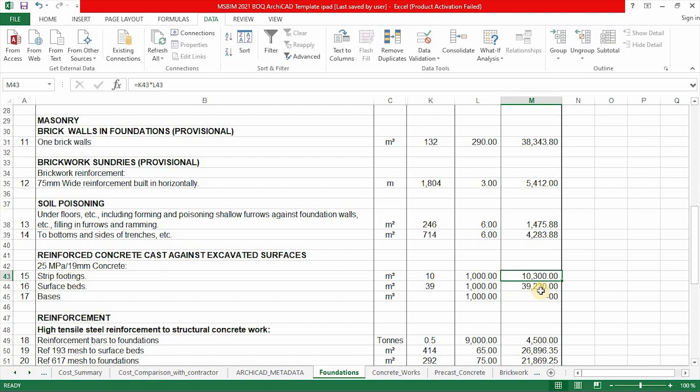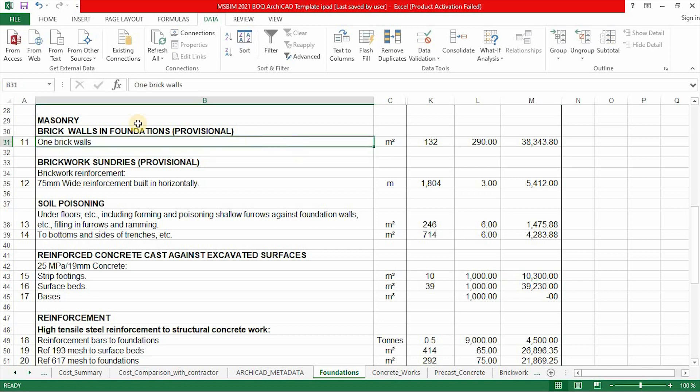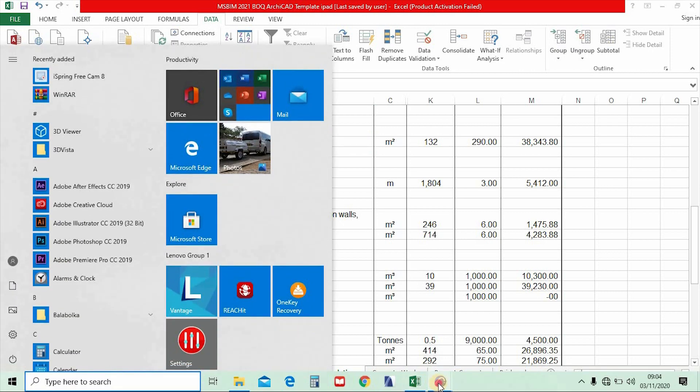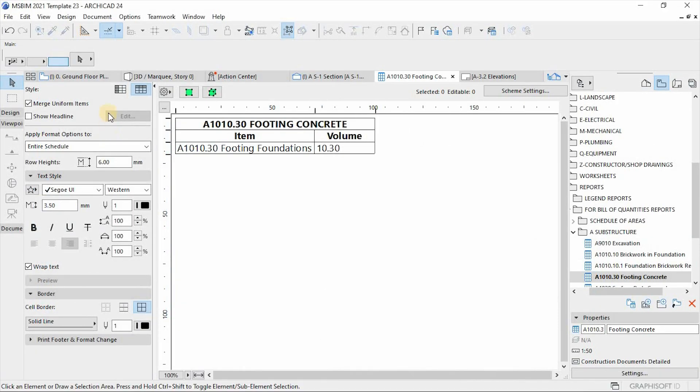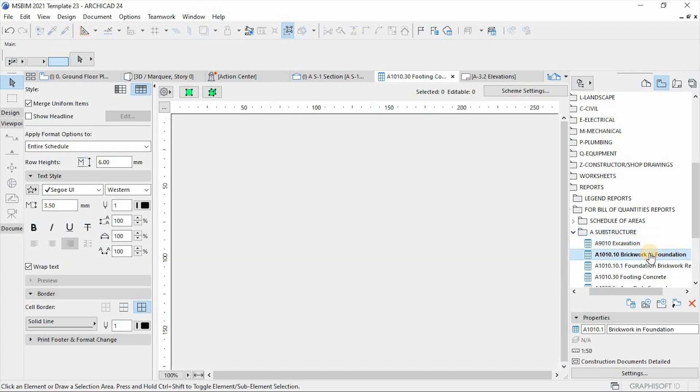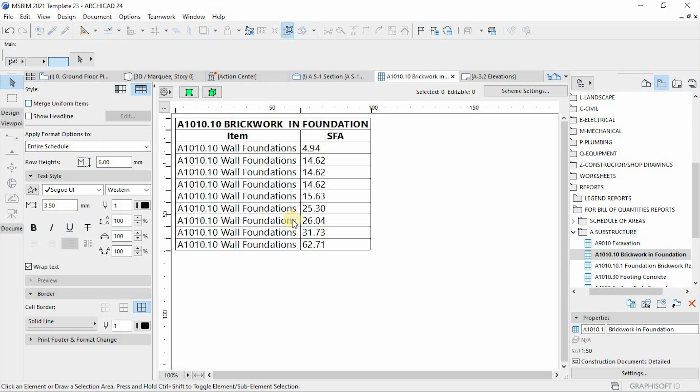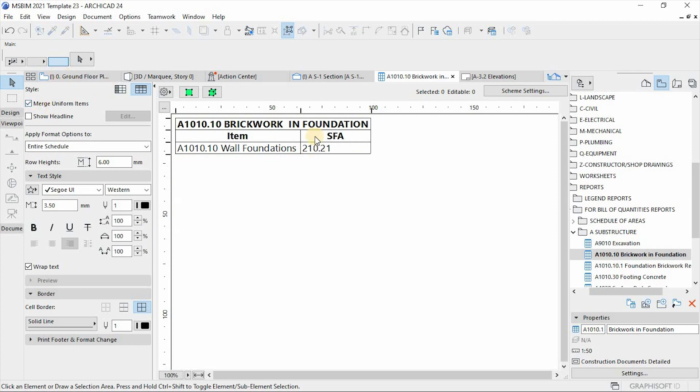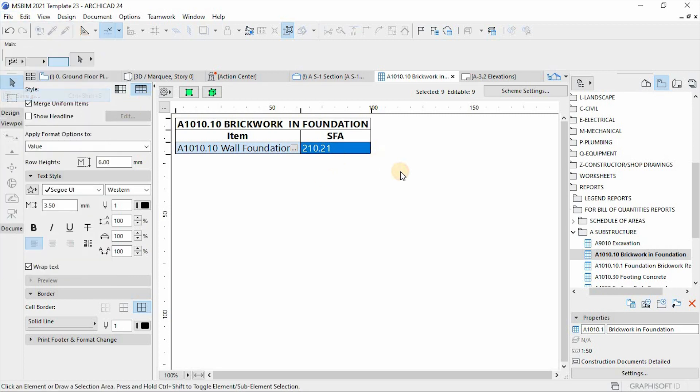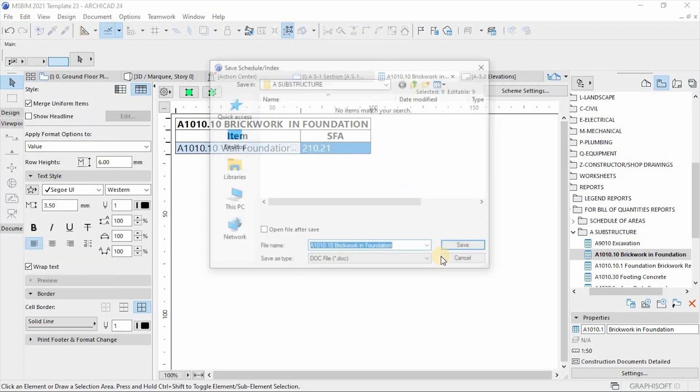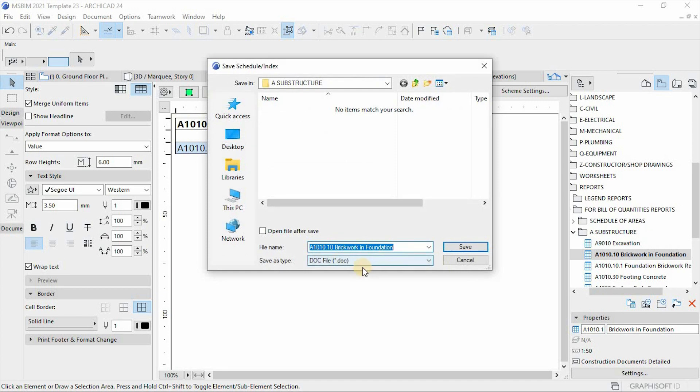It makes sense, right? I hope it makes sense. Let's do it for the brickwork. We have brickwork here. So it has been quantified, the cost has been derived from the surface area. If you go back to the ArchiCAD file and then find brickwork in foundation, there's also quite a number of elements here that has been derived from the model. So here we are using surface area so that you can determine number of bricks multiplied by the rate per brick. So let us export this information to our Excel template.